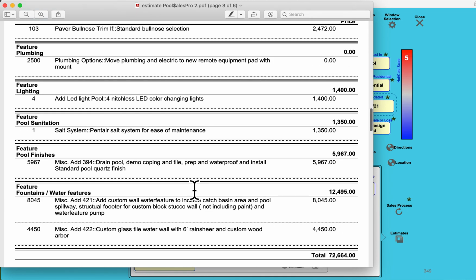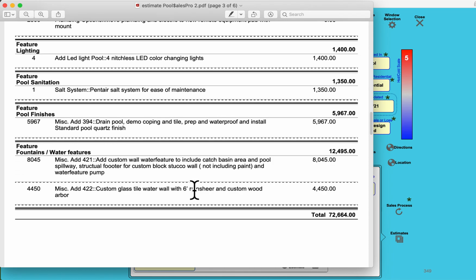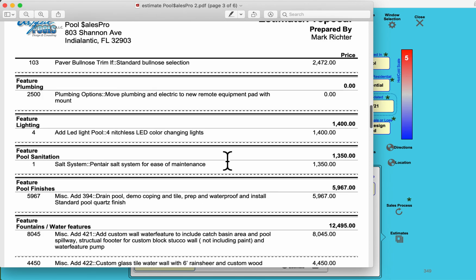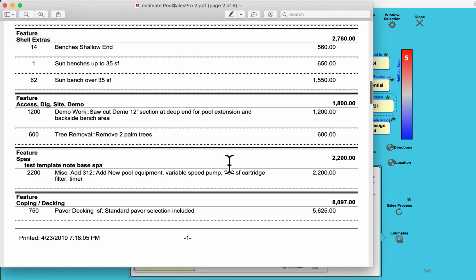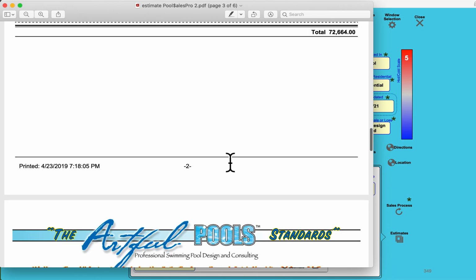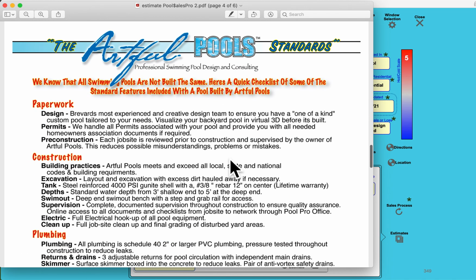I'm a big fan of itemized estimate proposals because it's simple. If it's here, you get it. If you don't see it, ask for it, or else it will be a change order. And the guy that gave you a lump sum, you better go back and figure out what he included in his proposal and estimate. Another thing I can do in Perfect Project Pricing is create a back cover page.